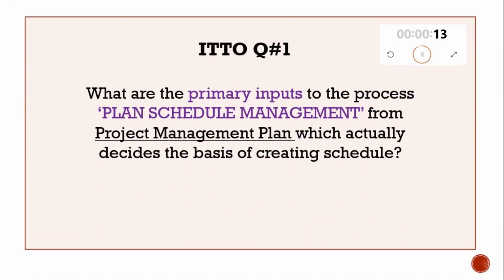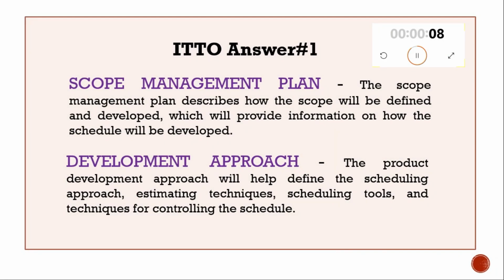ITTO question 1. What are the primary inputs to the process plan schedule management from the project management plan, which actually decide the basis of creating a schedule? Answer to question number 1: scope management plan and development approach. Check the slide for more details.